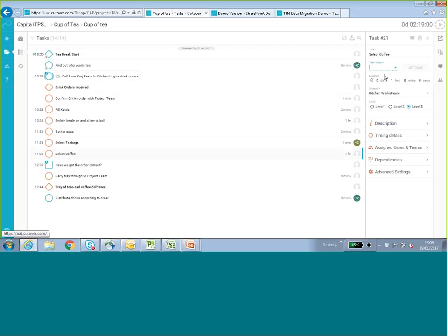We can see the task type. It is a normal task. The default setting for duration is an hour. It's not going to take an hour to select the tea bags, so say 2 minutes. The work stream: because we can have multiple streams, we can say it's not the project work stream, it will be the kitchen work stream.